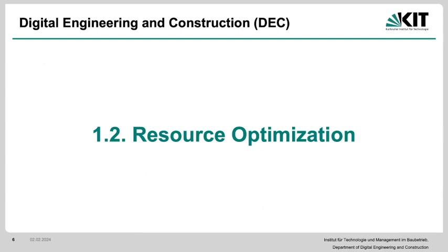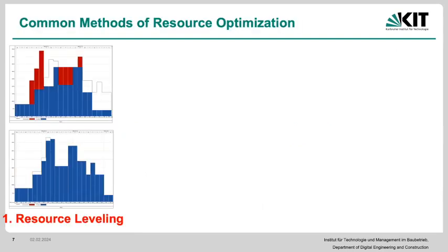So let's go right into it with respect to resource optimization, now that we've talked about some of these preliminaries. Okay, the first one is resource leveling. This is for a time where, let's say, the cost per a particular time is going to be limited. That means that we have some limitations in our resources. Therefore, we need to play around with the activities in order to make sure that the duration does not change. However, when we play around with these activities, we can actually meet or hopefully exceed those demands or that supply with respect to the cost that we have, okay?